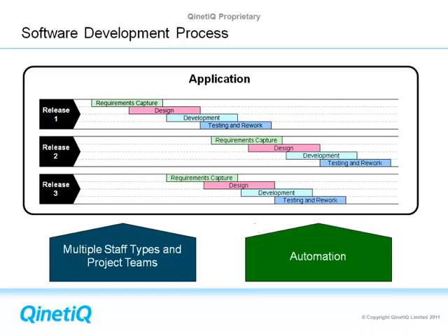And then on top of that, you have the different types of automation, which will be carried out by different resource types and will have a different impact on the different phases. So, for example, automated unit testing, which Mirek spoke about earlier on, would have the impact of having more work to do during the development phase, so the developers will have more activity to carry out, whereas there'll be fewer defects produced in the code, so the testers might have less testing to do, and the developers might have less rework to do.